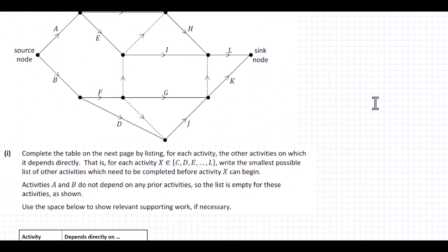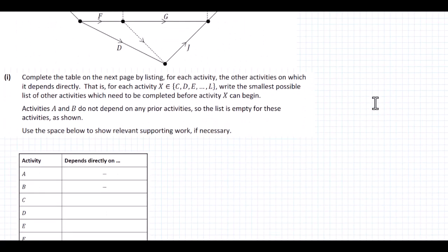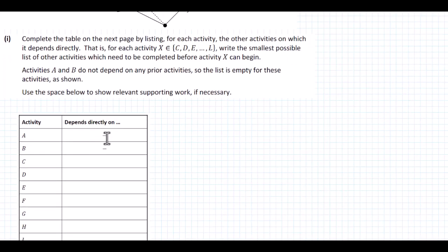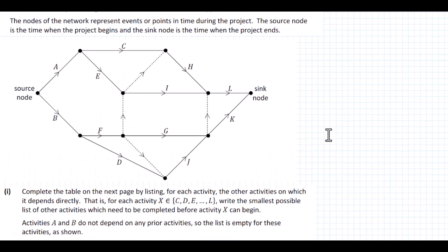So this is our diagram here. What we have to do is complete the table by listing for each activity the other activities on which it depends directly. That is, for each activity X, an element of C to L, write the smallest possible list of activities which need to be completed before activity X can begin. Activities A and B do not depend on any prior activities, so the list is empty for these. Looking at C, C simply depends on A and nothing else.